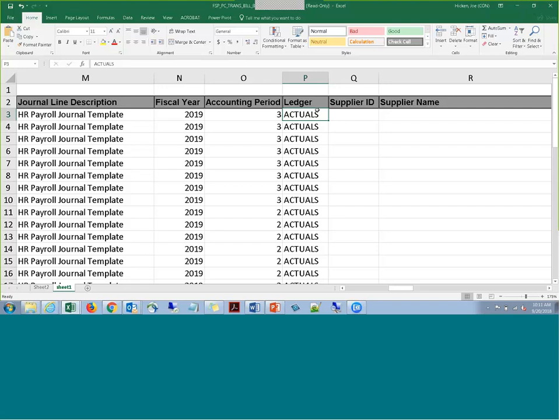And so the user is going to need to either write those rows off, so run the billing process and write them off, or down the road, hopefully we can configure a business process where your analysis type on those entries is all BAL or something like that. That way it would not be picked up for billing, and that would be one solution. Whether it's a business process or a system customization is yet TBD, but I did want to flag for you that we did see data coming over for billing when it's a CAFR Mod or CAFR Full entry, and we don't want that to be the case.